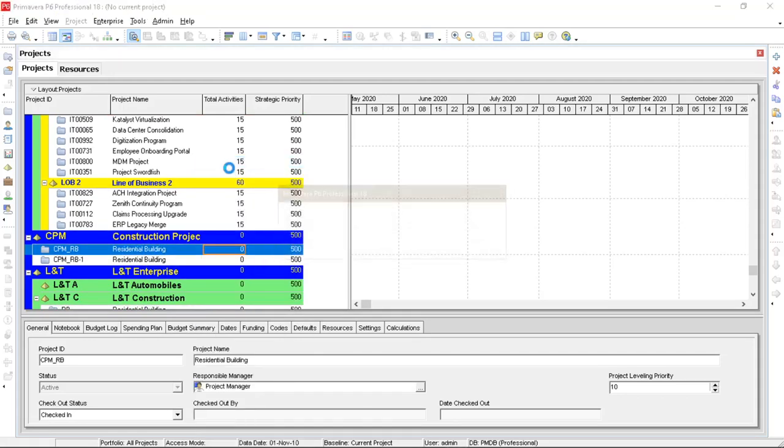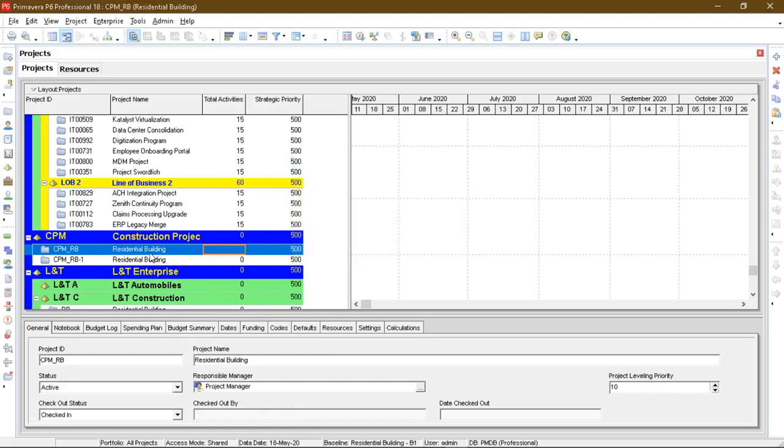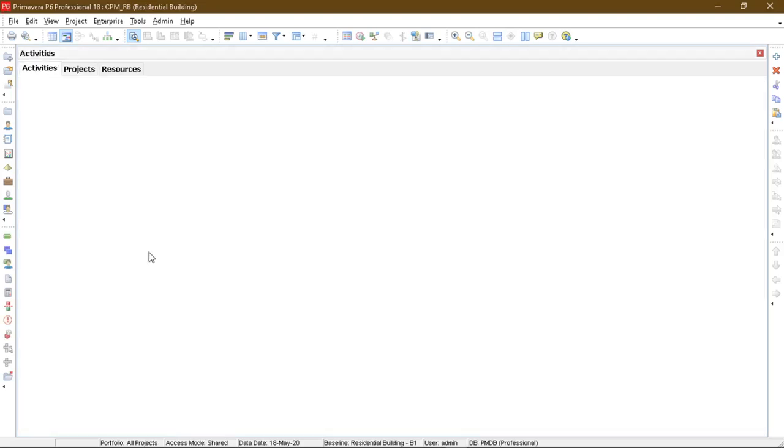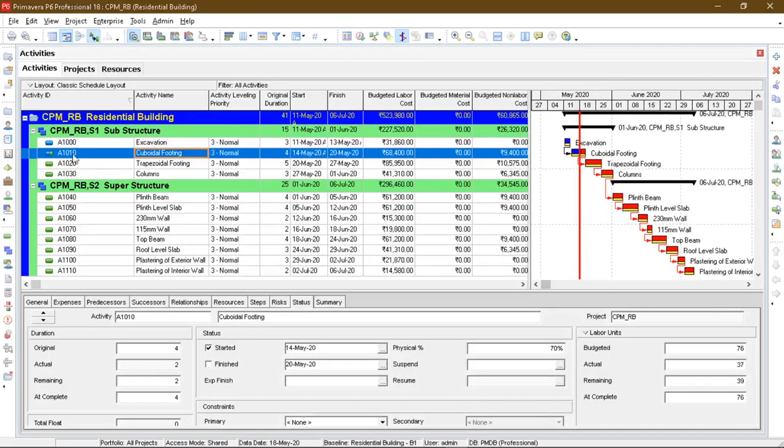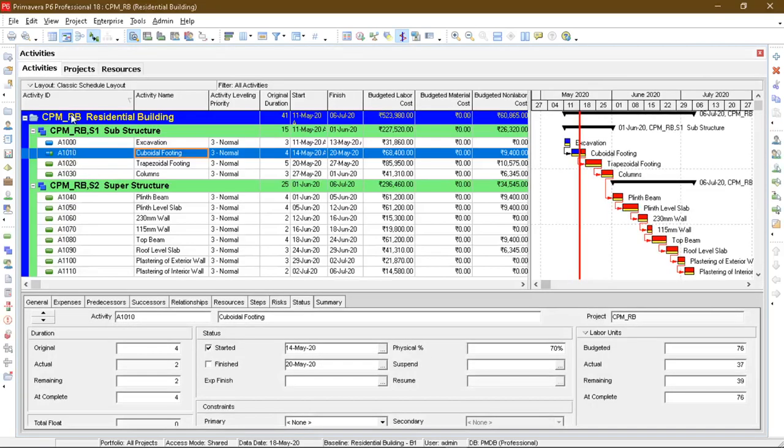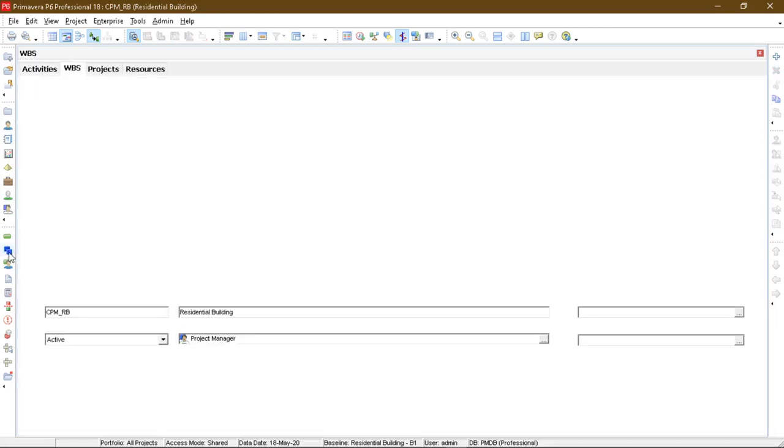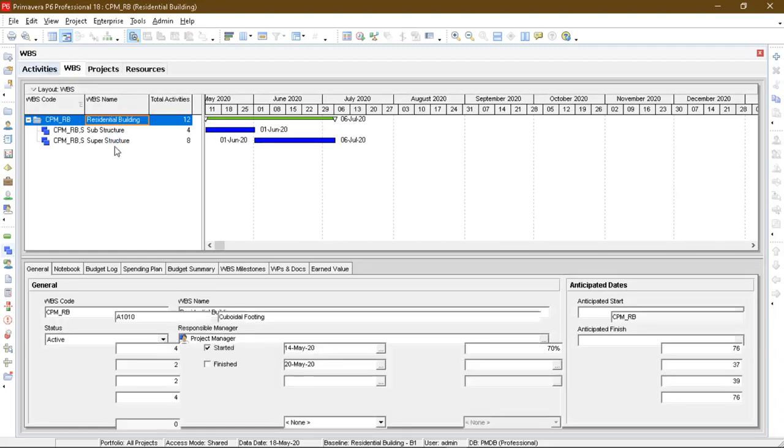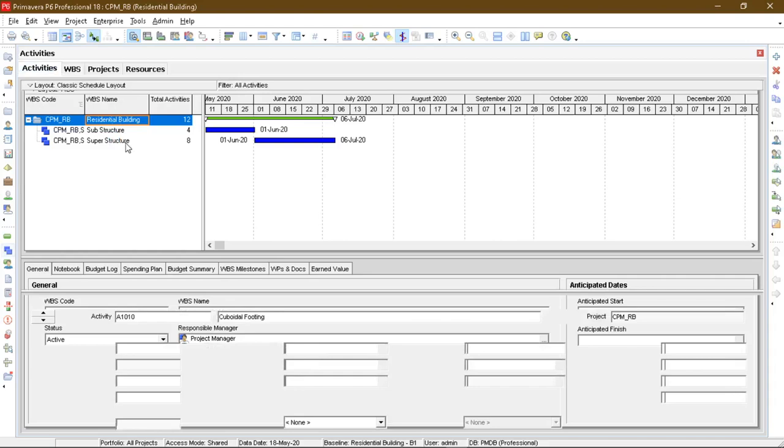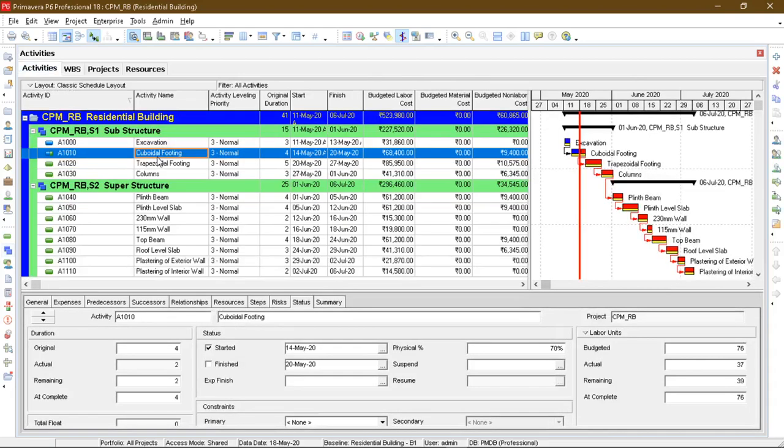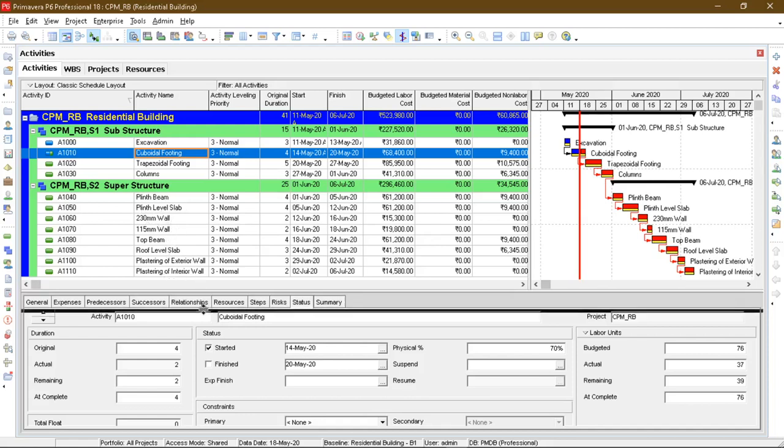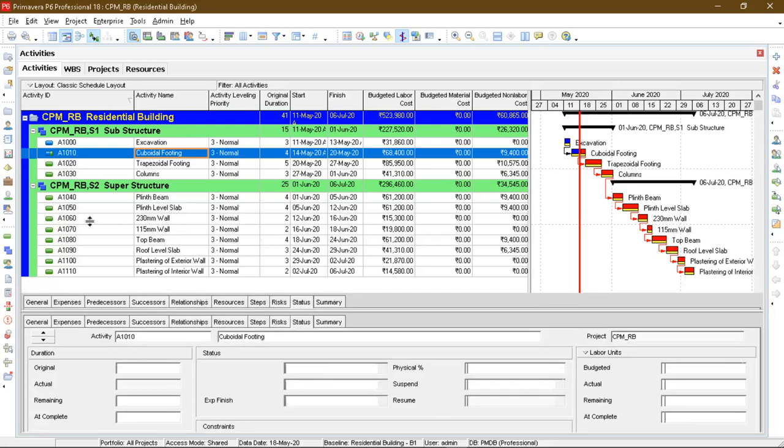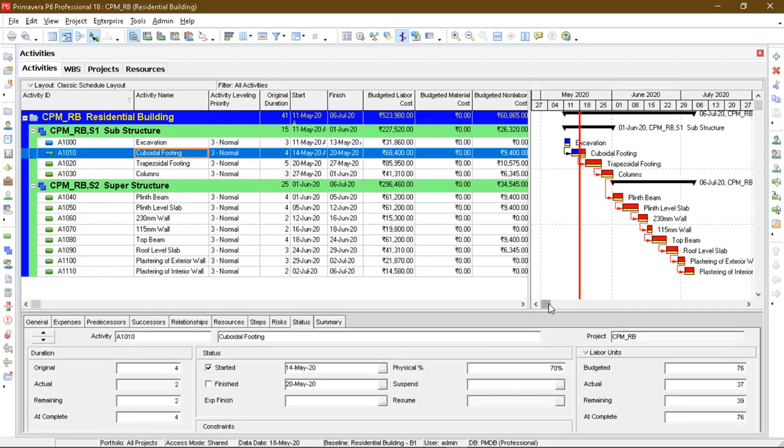Opening the project and as you can see I have defined the work breakdown structure as substructure and superstructure. Coming back to the activities, I have defined some activities for the substructure such as excavation, cuboidal footing, perception cuboidal, part of the footing and columns. Now for superstructure: clean bin, plinth level slab, wall 115mm, wall top, DPC, and slab.